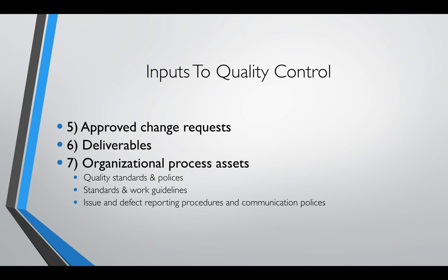Inspectors are trained personnel in a specific area of inspection. Inspectors are independent and do not enjoy any type of gain from their decisions. Inspectors do not direct the contractor. Inspectors must make decisions regarding conformance to specification or codes, and inspectors can accept or reject work.